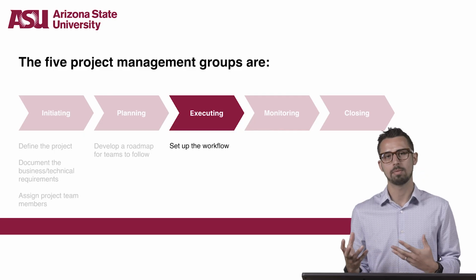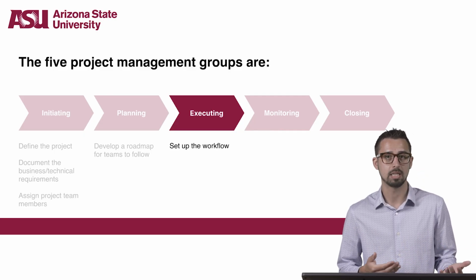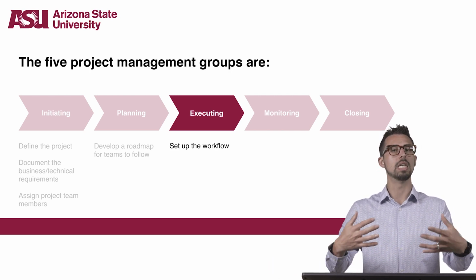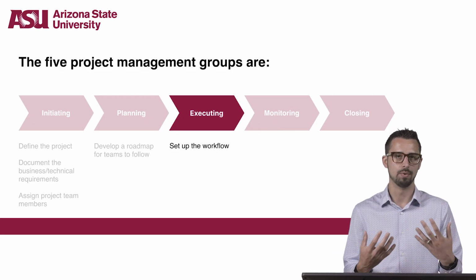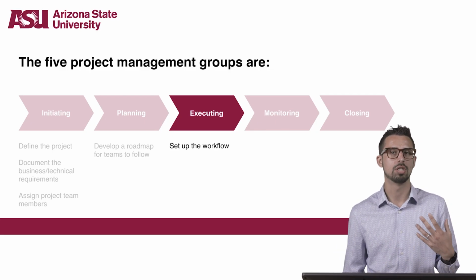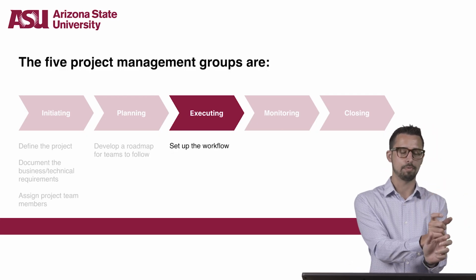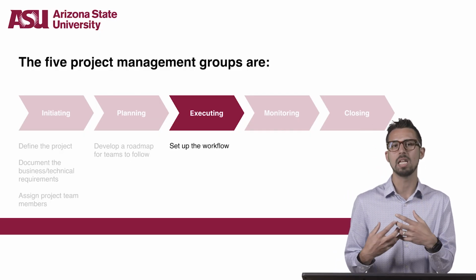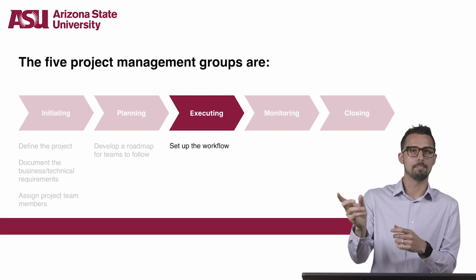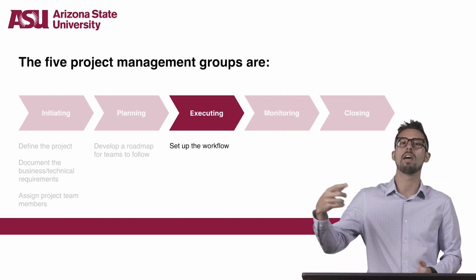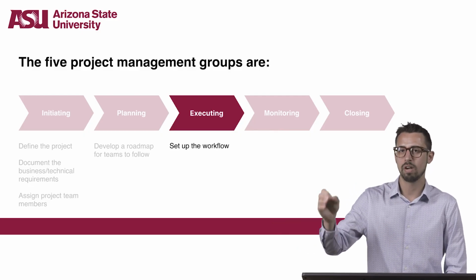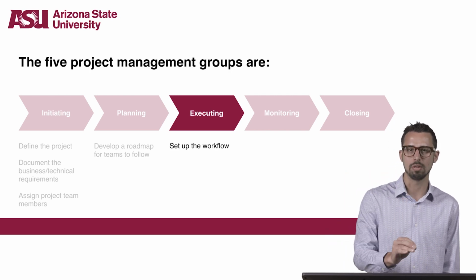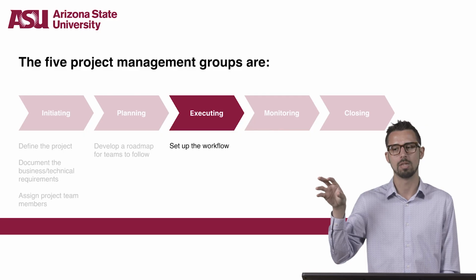Since Agile best practices recommend an iterative and incremental approach, your workflow in an Agile framework needs to accommodate cycles of work. A standard workflow would often assume that a task would move from in progress to in review to complete, but with Agile project planning, you may need to exchange tasks between in progress and in review several times before they ever get to the complete phase. And it's critical that whatever project management tool or software you're using can handle this without losing visibility of the project's progress.